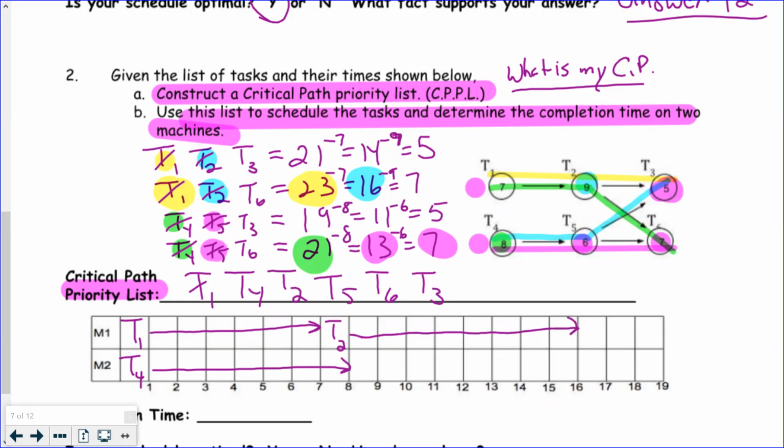It's right there. Looks like I'm running out of a little room here. So 2, 4, 6, 8, 9. And that's off my list. Okay. So I also scribble this out when I schedule this. It kind of helps me see what's ready, what's dependent. And now the next one on my list is task 5. Well, I can run task 5 right after task 4 is run. So task 5 goes right there. It's 6. There's 2, 4, 5. There's 6.